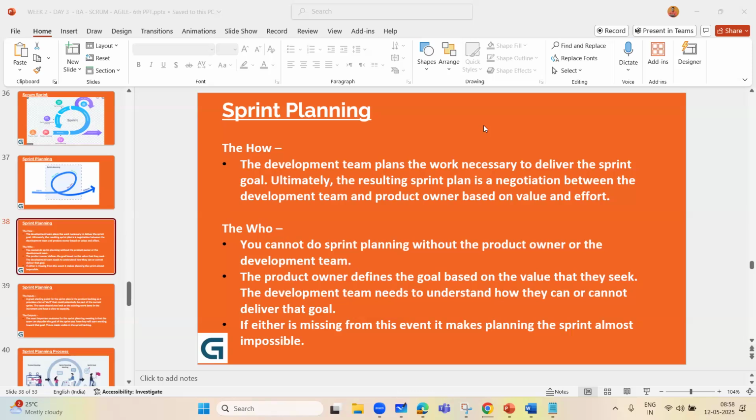The second factor is that everyone is taking major time because this user story is not sliced well enough, it does not meet the INVEST criteria, it is not small enough. Considering all these factors, you will slice them further and make them smaller to achieve it in less time. So the whole idea is to understand whether it is small or not.